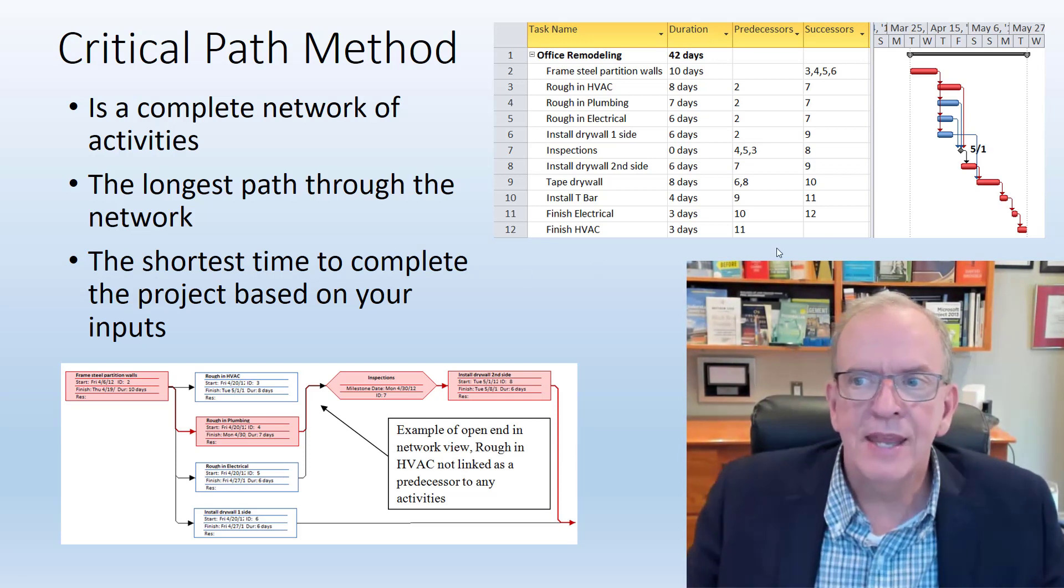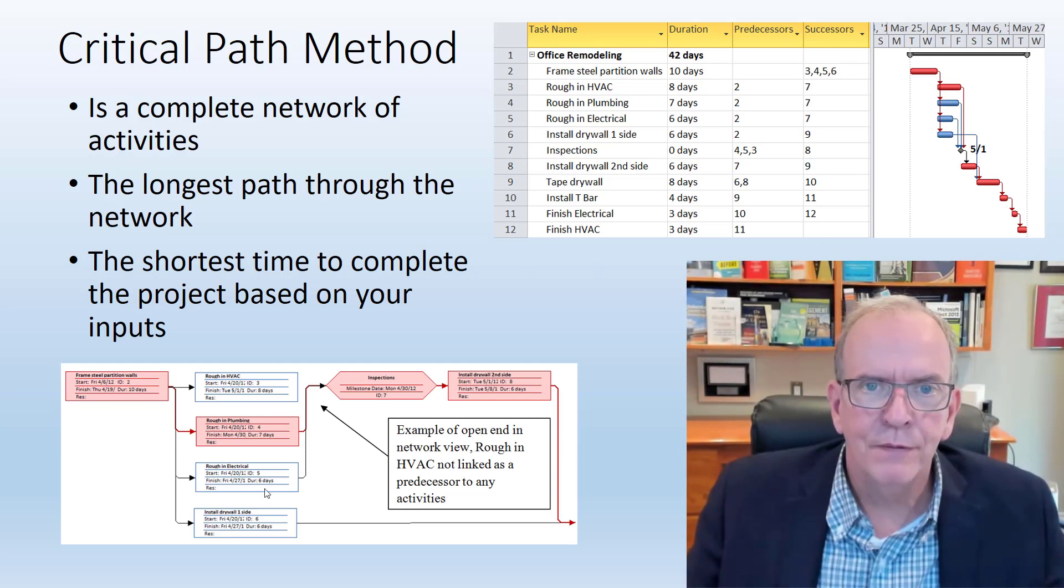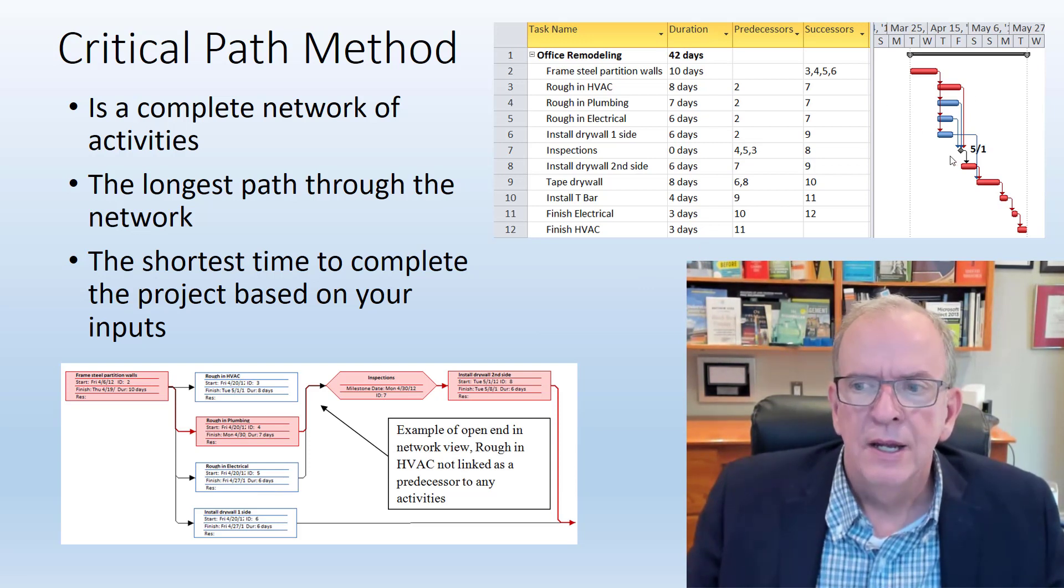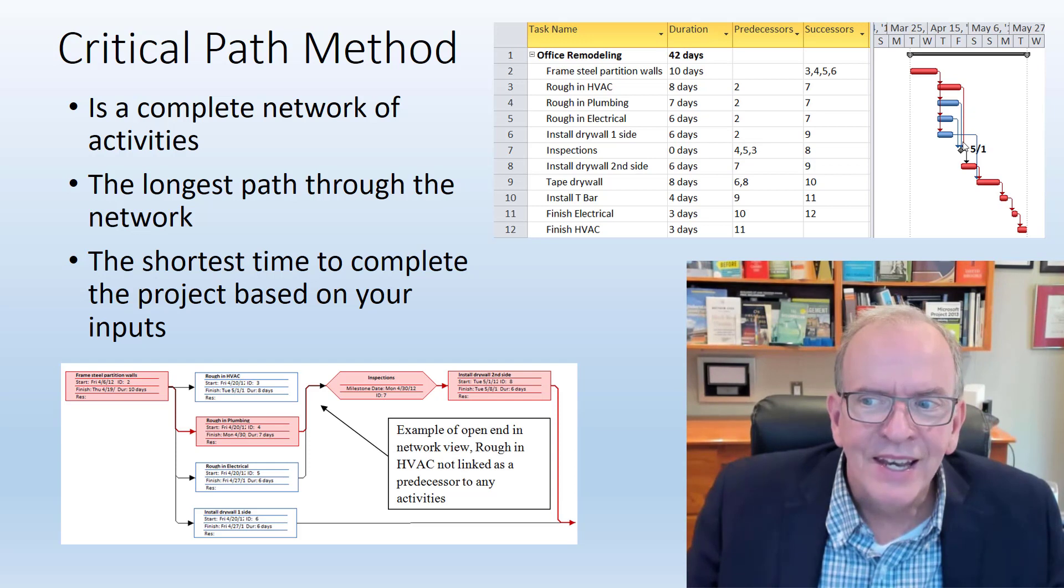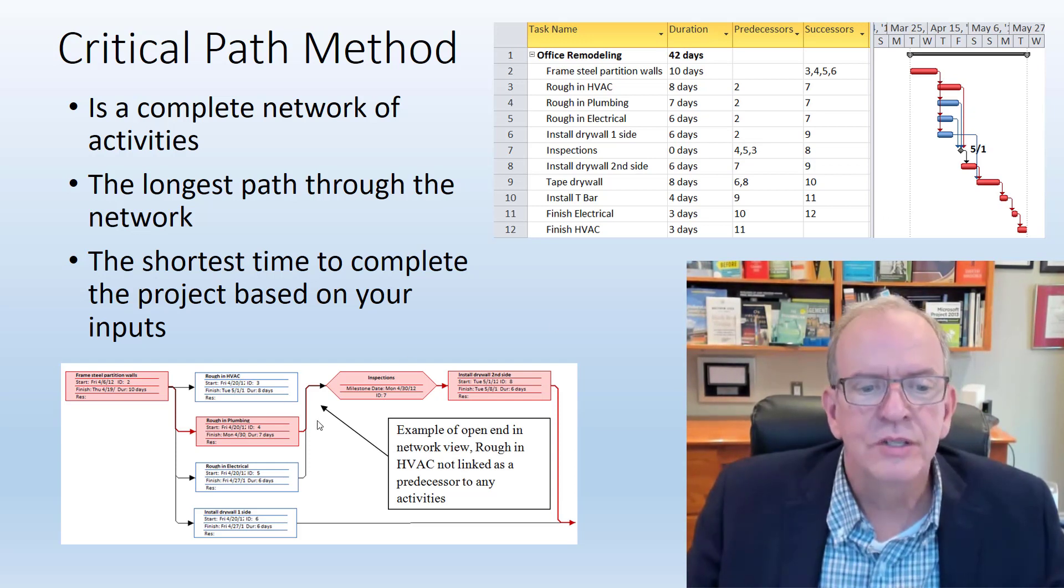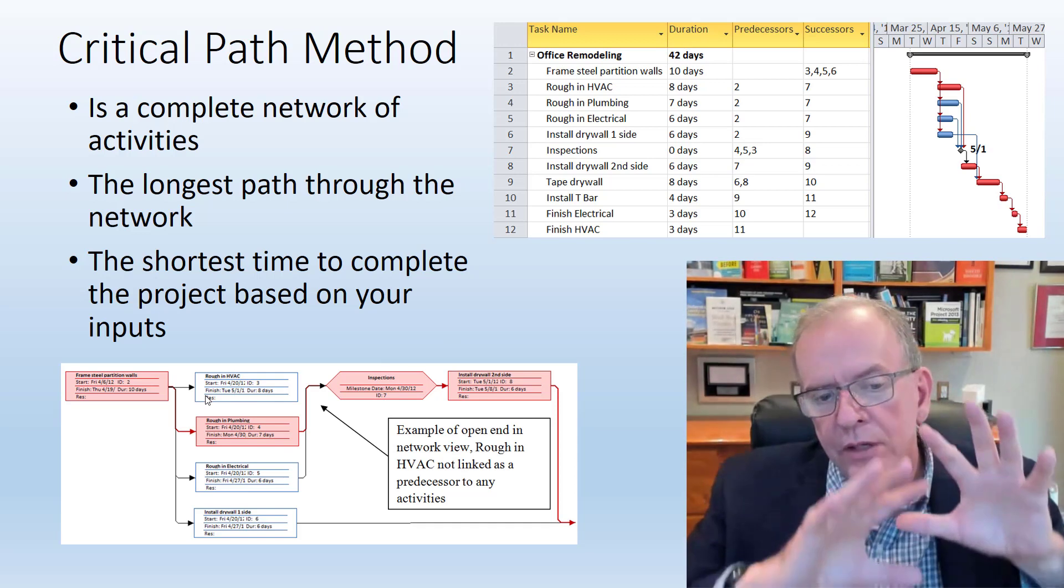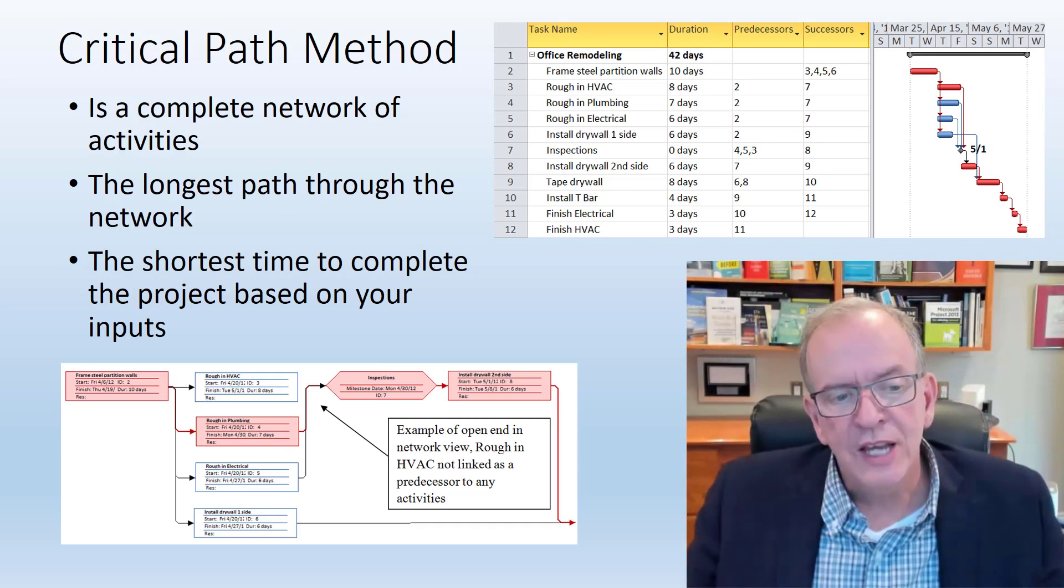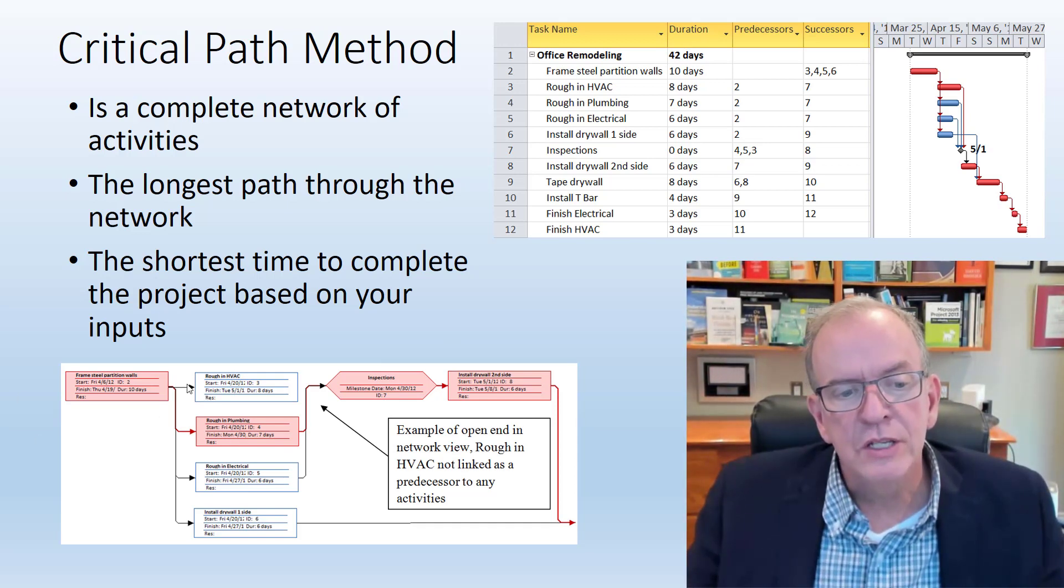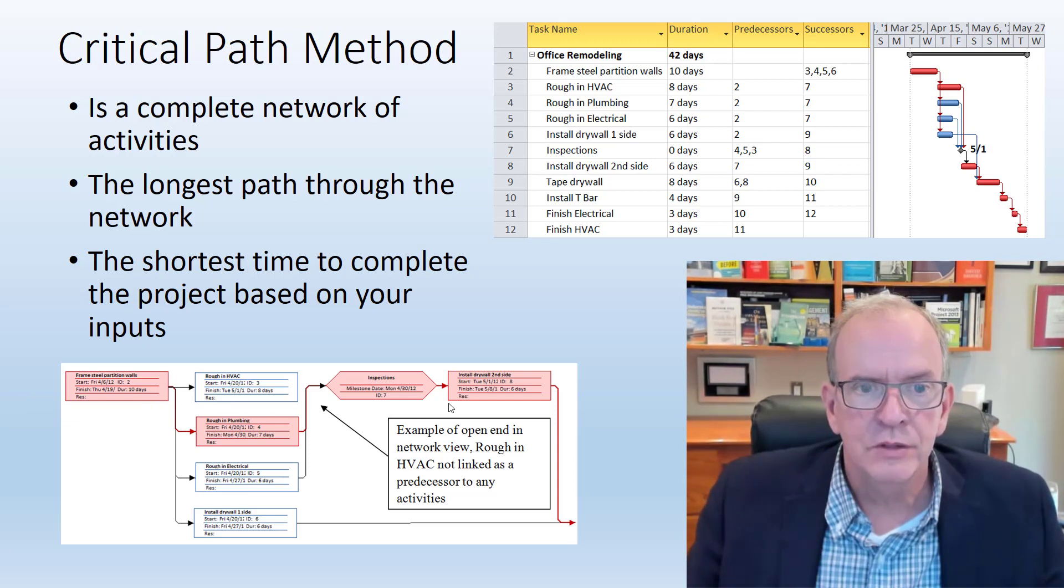We had Gantt charts long before we had the critical path, maybe about 50, 60 years earlier. Henry S. Gantt invented it around 1910, but it didn't have the connections and the critical path calculations done. In the background, the network diagram, which is the schedule logic of the connections, is doing all those calculations.